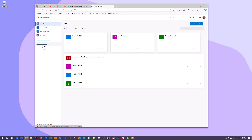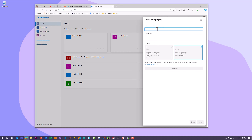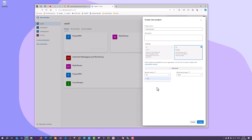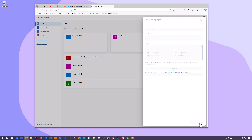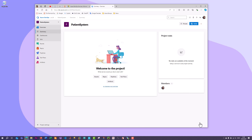Once you have an organization, you need to create a project. I have already made some projects, but let's create a new one. Click the 'New Project' button, specify a name - for example, 'Patient System' if you're creating a patient system. Select private, and under advanced you can select version control. Under work item process, you typically want to select Scrum. Then just click create, which takes a few seconds.